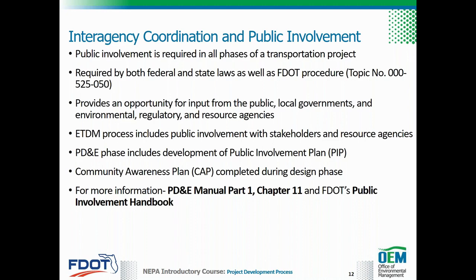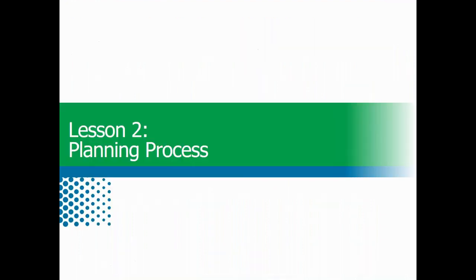Public involvement during construction involves responding to public requests for information regarding construction activities and informing the public about construction activities such as lane closures, median changes, business access impacts, work hours, work zones, detours, temporary access, and grand openings.